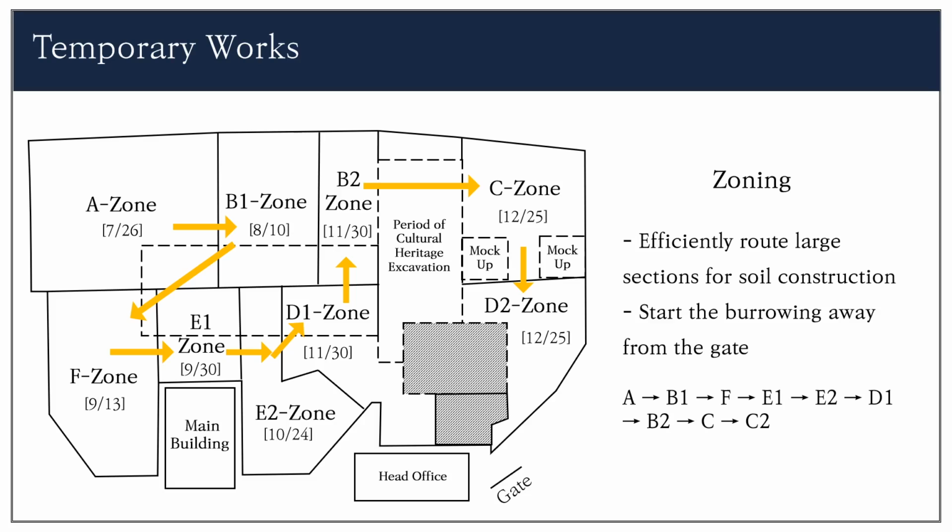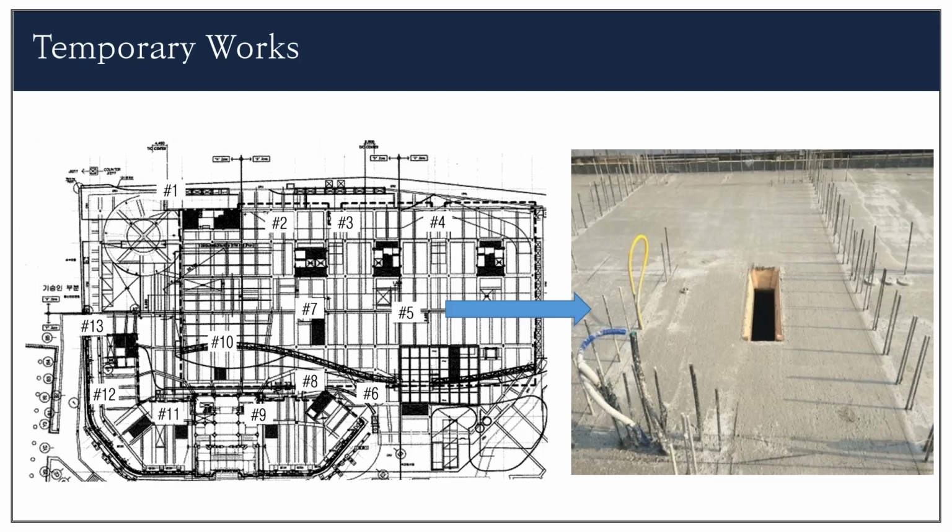The excavation of the main building was carried out between F and E, but it was proceeded separately using the SUFAM previously described. The construction work is limited to a narrow area to minimize interference by natural construction lines and zones, and install the appropriate inlet for each zone individually. Through this, they brought in molds and river materials. This inlet was made by opening the slab, so it should be arranged with consideration of the work efficiency.